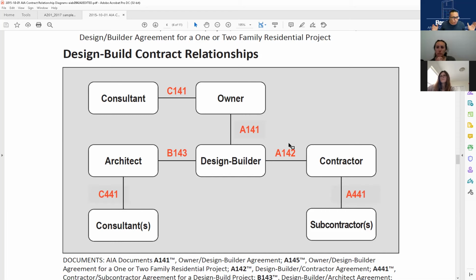So they see these, they walk through the whole thing. They're basically doing the punch list. By the way, I'm supposed to do the punch list on this job because I am the contractor. And as you probably will learn or have learned on the 801, the contractor generates the punch list of all the items that are missing. Not the architect, not the owner, the contractor.